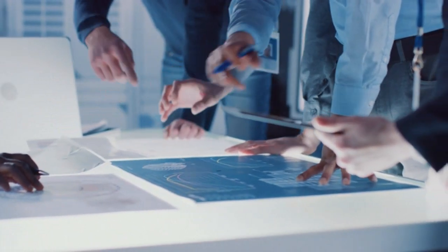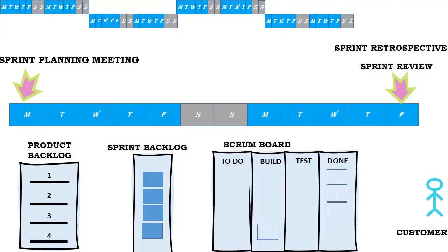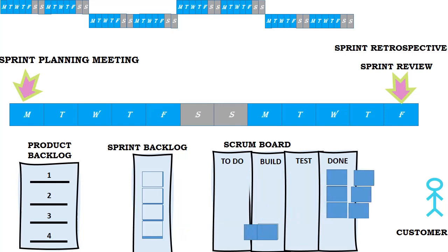The backlog is the ordered list of all the work presented in story form for a team. There's no need to create all of the stories for the entire project before the work starts, only enough to understand the first release and then sufficient items for the next iteration.